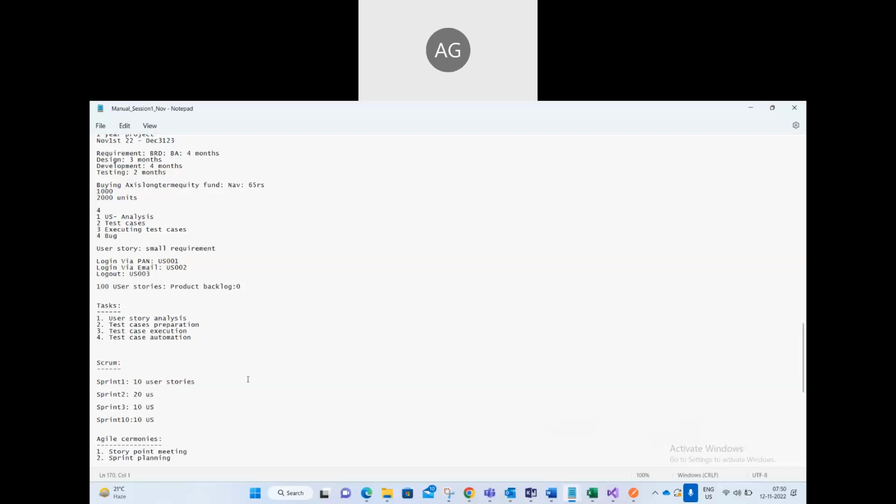It depends. In Microsoft, we have 3-week sprints, but with most of the clients we have 2-week sprints, okay. In this 2-week sprint, let's say we committed for 10 user stories. Who will commit? The team. The team says, based on the team capacity, we committed for 10 user stories. Now we have to develop all these 10 user stories.